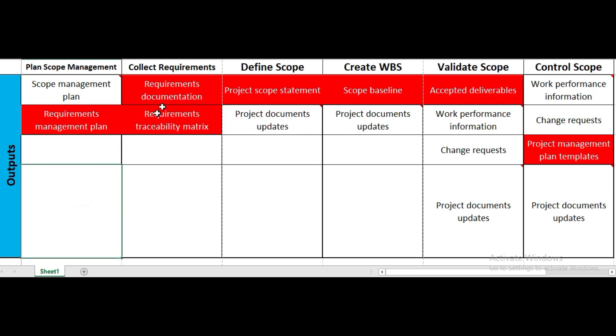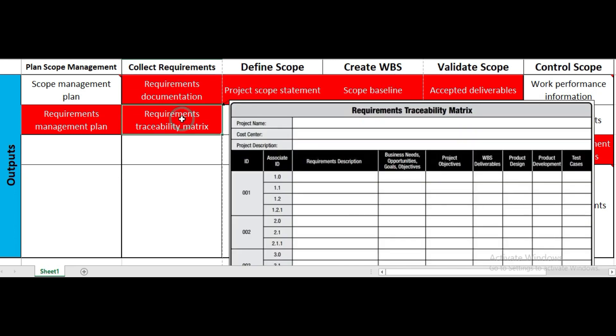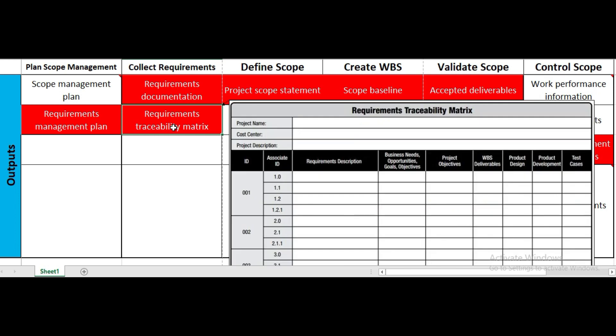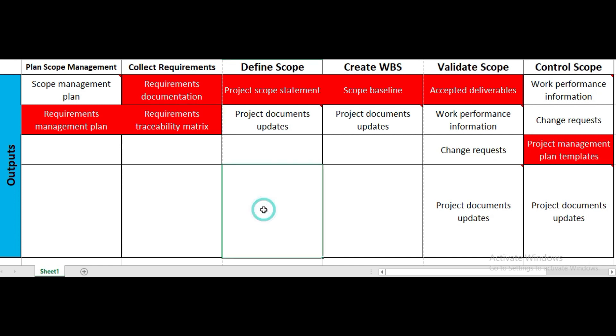The outputs of collect requirements are requirements documentation and the requirements traceability matrix. Requirements documentation may include quality requirements, project requirements, solution requirements, and business requirements. The requirements traceability matrix tracks how different requirements relate to project deliverables.